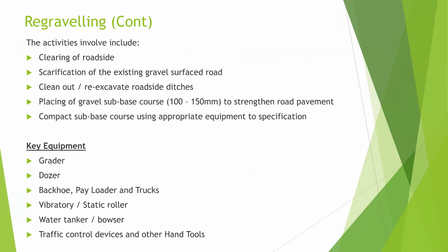Now, the key equipment here basically are the earth-moving equipment like the grader, dozer, backhoe, payloader trucks, the vibratory roller and the static roller, water tanker or bowser, and the traffic devices and other tools.